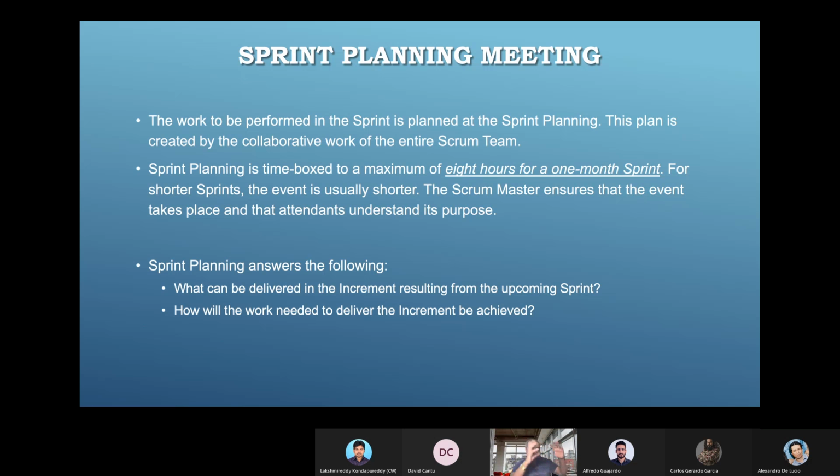Which means in sprint planning meeting 1, you are pulling the stories, the PBIs, from the product backlog to the sprint backlog. That is sprint planning meeting 1, or the first part. The second part is, when this is done, you decide how we are going to deliver it, further breaking it down into tasks and subtasks, further discussing that, and doing story pointing and all these things if it is not done. Okay, so this is the first ceremony.